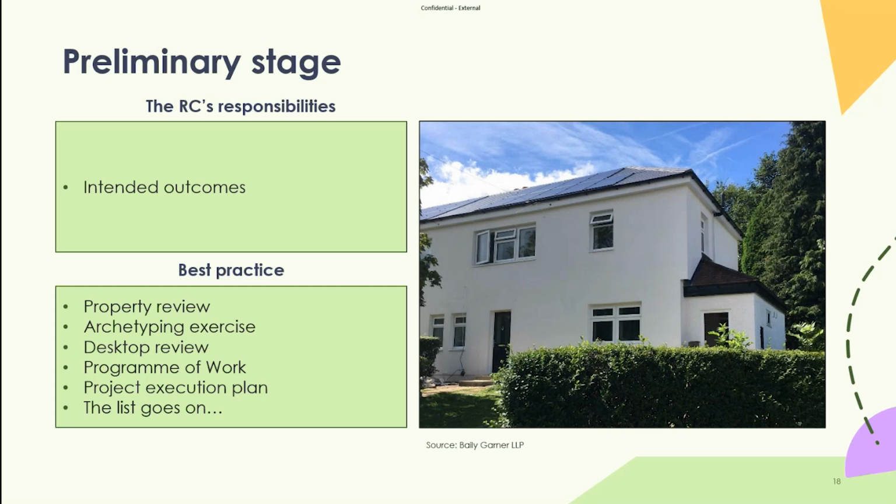And for that particular project where we were looking at EWI as a primary measure, it really helped weed out those properties that may cause us headaches and issues at an early stage. And that can then really inform the latter stages of the project. So we don't have to wait until our assessor's been out and gathered that information. With the modern world that we're in, a lot of that information can be ascertained.